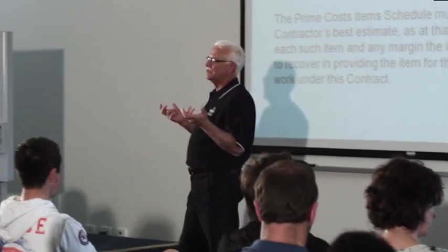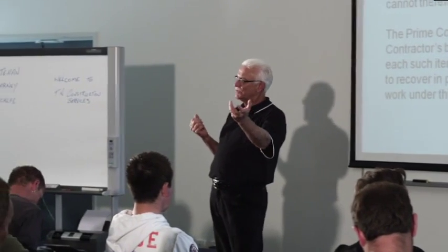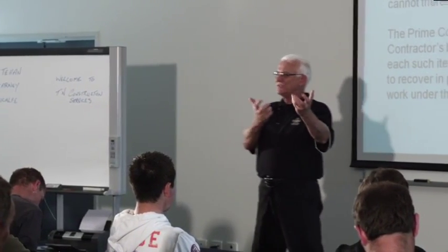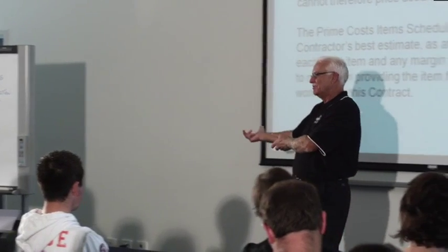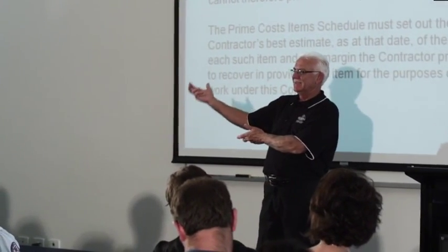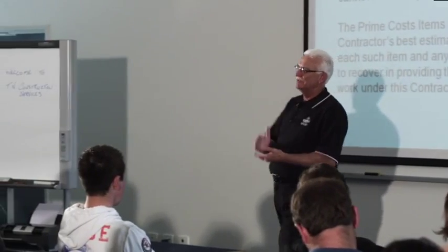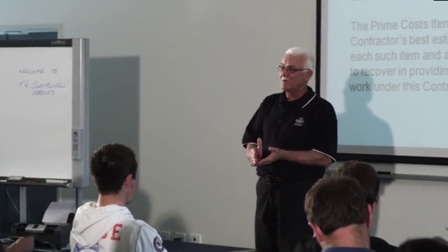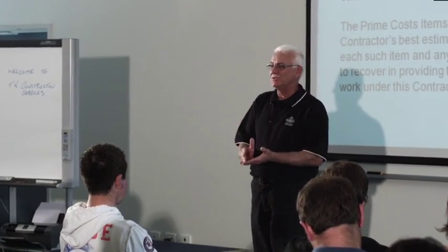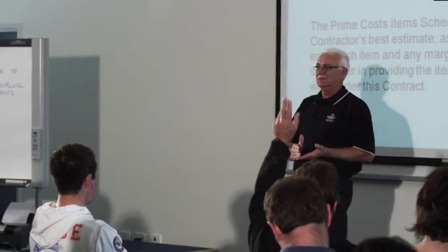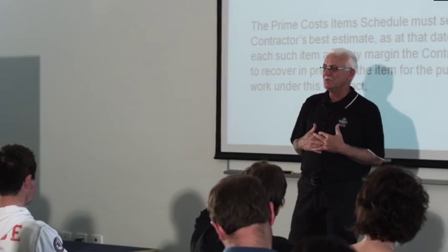That is tough, because the owner's under obligation as well as you are. The obligation for the owner is that you will only deal with the builder, right? When you sign a contract with your subbies, you really should be stipulating to them, guys, if you're working for me, don't even think about doing anything for the owner. It's all got to come through me as a builder.